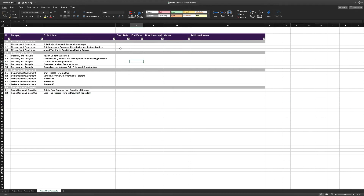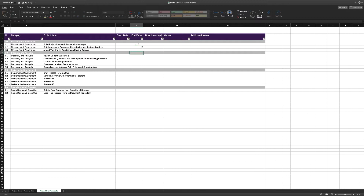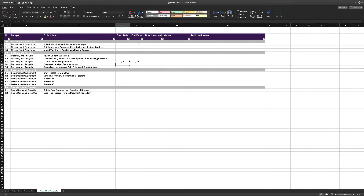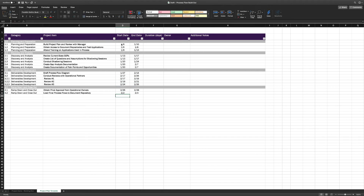We're also simultaneously ordering these items in each category and eventually start transitioning these to the actual project plan template. From there, we start adding dates — starting with the dates that we know of. In this scenario, our manager asked us to review our plan by the end of the week, so we put that date down. We also know the shadowing sessions are already on the calendar, so we put those dates in as well. And finally, we generally know when the final process flow should be complete, so we put an end date in there. From there, we start logically adding dates across the different activities to fit into the known dates that are already on our project plan.